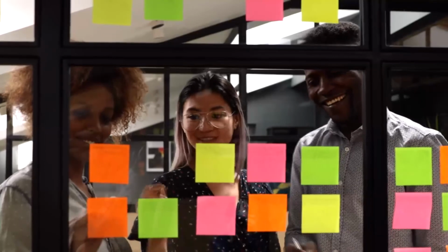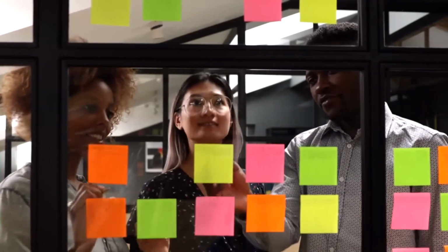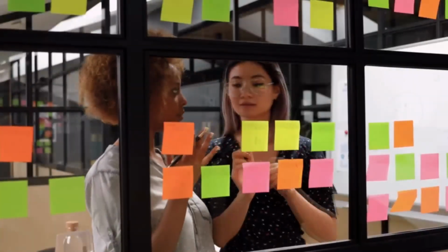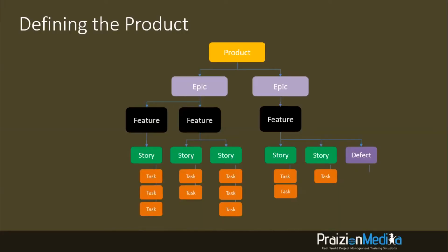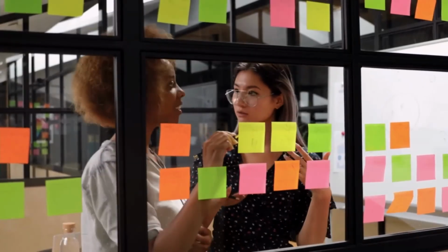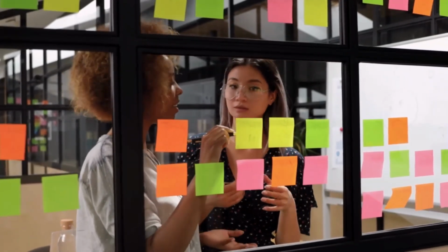So at this level, we've gotten it down to the point where we can bring it into the sprint, and it's understandable. But we go to an even lower level on some endeavors, not all, not in every single endeavor, but you could break that down into the task level. And you could estimate each of those tasks and define who's going to work on the task.